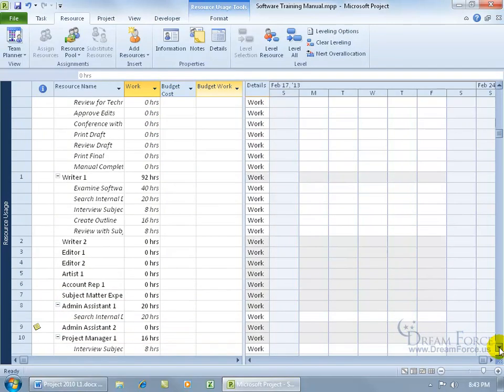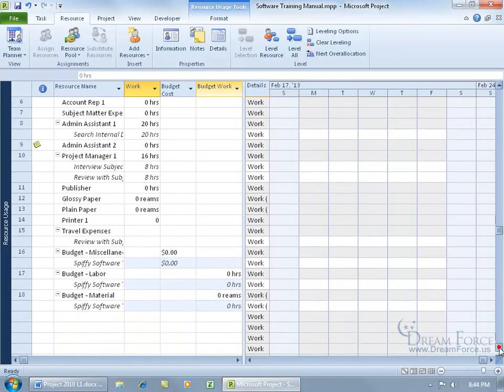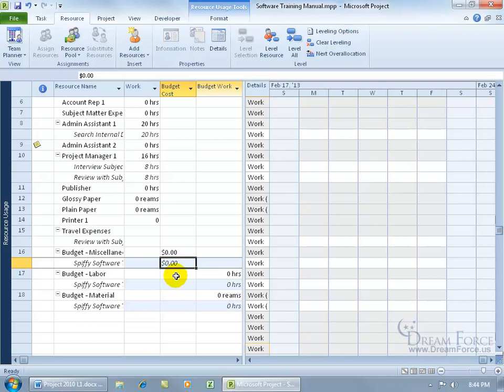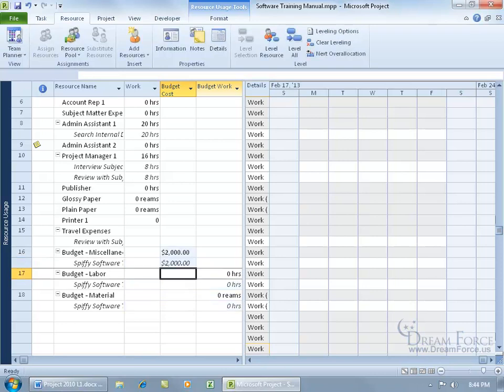Scroll down to the budget resources. For the budget cost, I have 'miscellaneous' — I wanted to show you that it doesn't matter what you call your budget resource; as long as cost is assigned to it, it's a budget cost resource. Go ahead and enter the total amount of budget you want to set aside for your cost — let's say $2,000 — then hit enter.